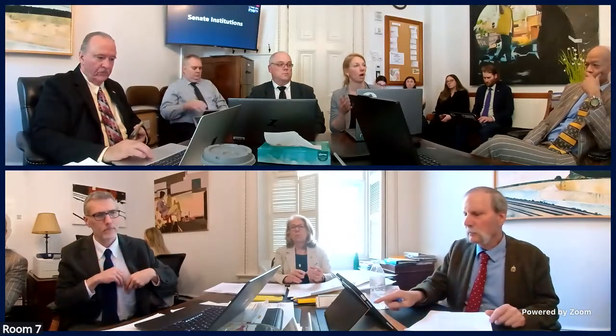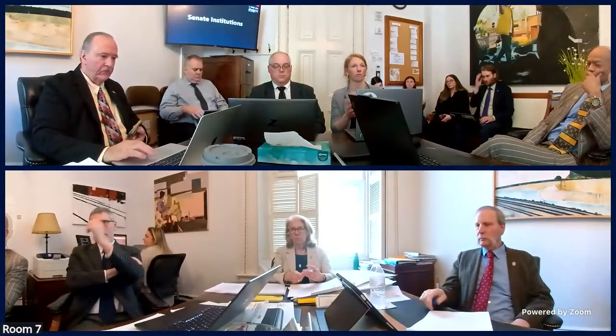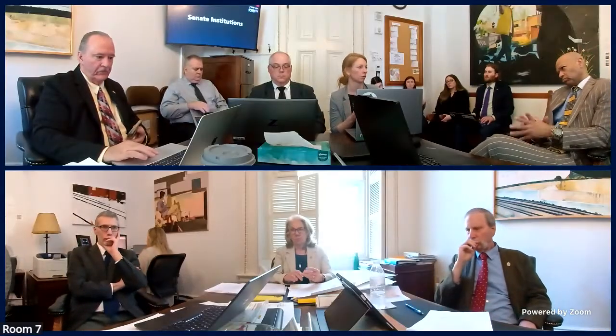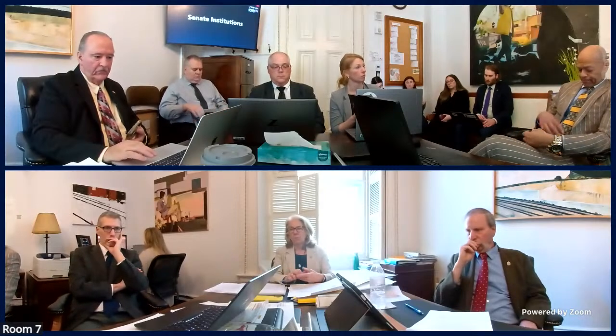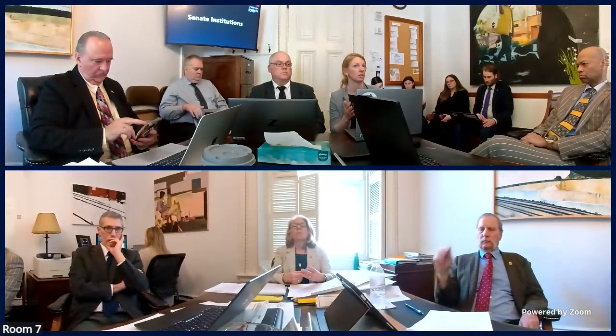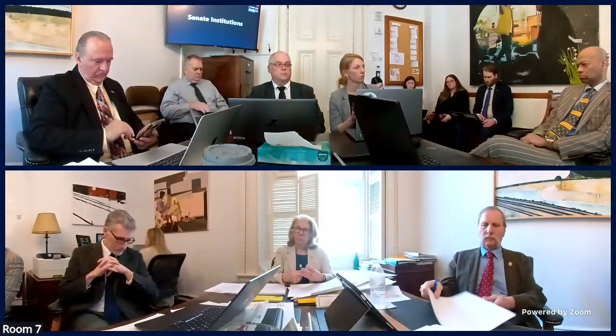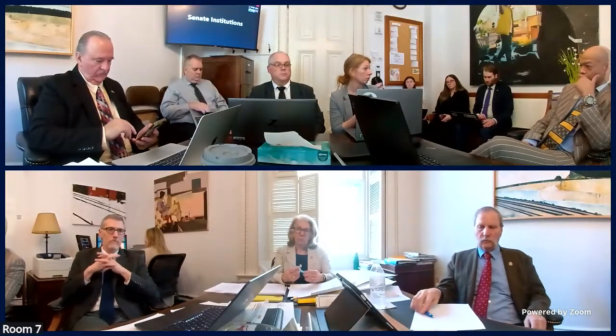It's important to know that not only from a budget perspective is there efficiency in including everything we want to do at once, but especially in our correctional facilities, there is an operational consideration, right? We want to reduce our disruption, our work in the facilities. There are folks in there 24/7. And so that's where it's really important for us to combine everything at once. And if we're in a position where we have to cut things out that are really critical that we're then going to have to address later, there's a disadvantage to having to do that.